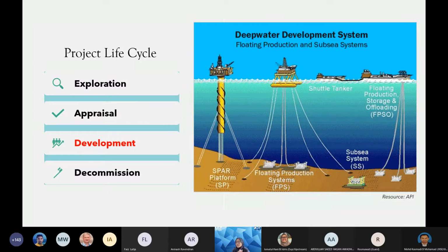Okay, so what are the reasons? The first one is the equipment is rather expensive for you to book, and there are not that many DST subsea trees available in the market, so you have to book it upfront, and that's expensive. And in the event that there's no discovery, there's already a sunk cost to you.